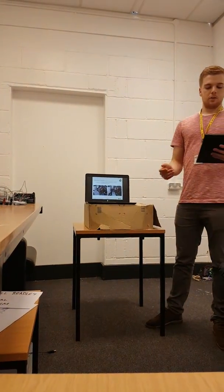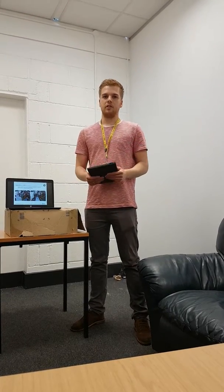This jig will allow the engineer of the test cell to run through this test for longer, as they won't have to stop to allow for the engine to go in before the exhaust is made. For every day that the test cell is not run, we'll lose about £1,000. So it quickly accumulates if you have to have 2 weeks of downtime just because someone needs to make an exhaust and instrument it. So the idea is if you can make everything outside of the cell, you don't impede the test cell at all, and you can carry on testing.